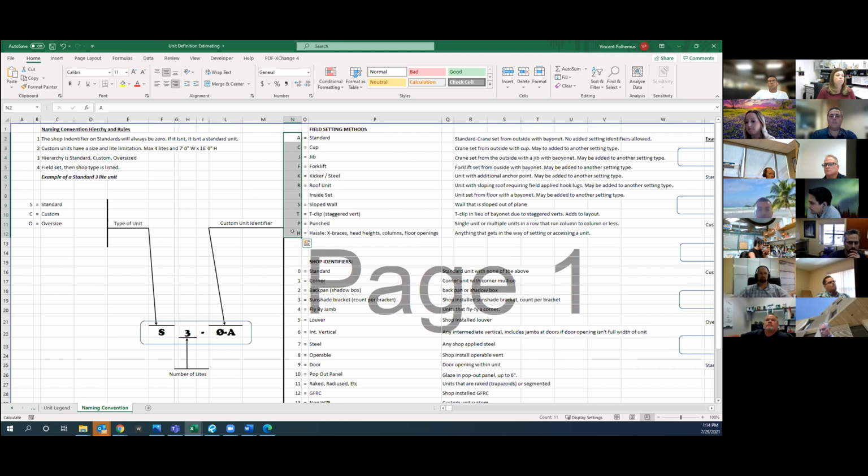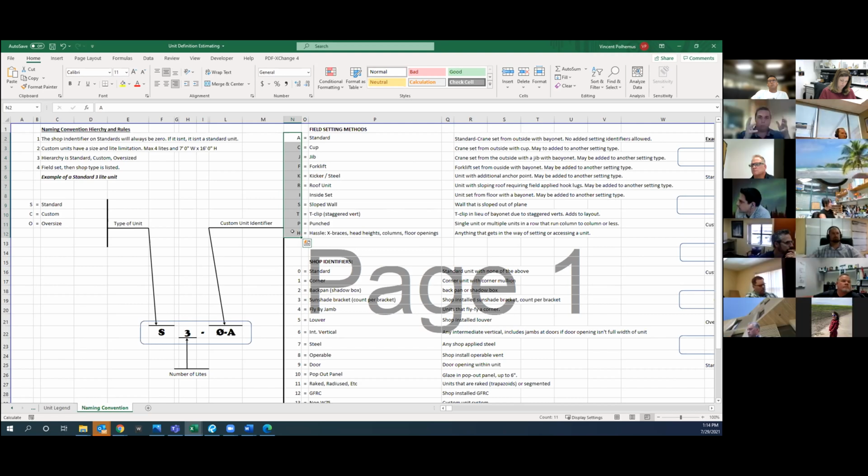And we're able to go, okay, yesterday they made 20 units on this job. They were all standard S2s. We gather what were the time cards associated with the people that built those units. And now we know, okay, yesterday we built 20 S2 units and it took us 80 hours in the shop to build them. We gathered that data every single day, starting back in 2018, and we're still gathering it today. But by 2019, we had enough data that we could actually start estimating using those names. So I wanted to give a little background on that just so we're clear where this came from.